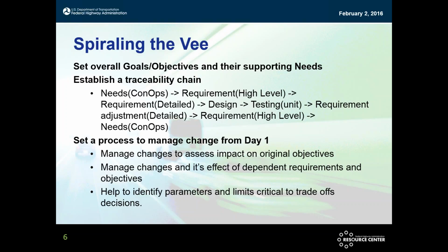I rely on the ability to trace from your concept of operations into every single requirement, into every single design element. If there are changes in the process or a change in a design, I want to know how that impacts the original objective that you're trying to achieve. And if you do your traceability correctly, you can identify other requirements that are also going to be impacted.